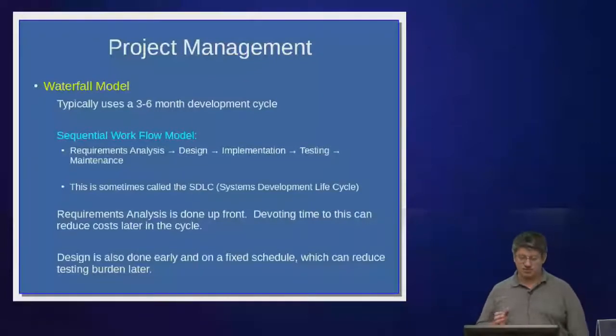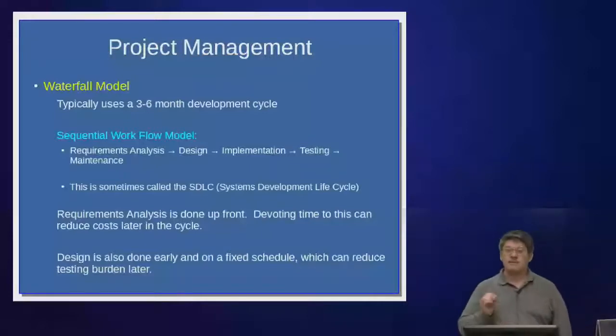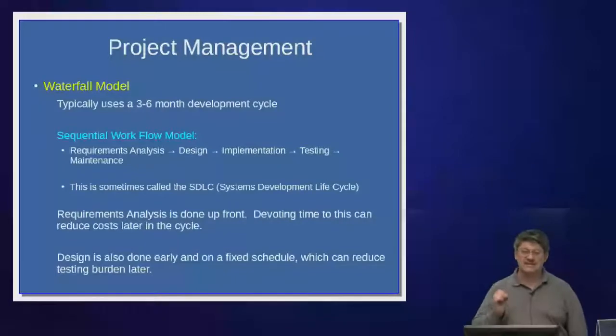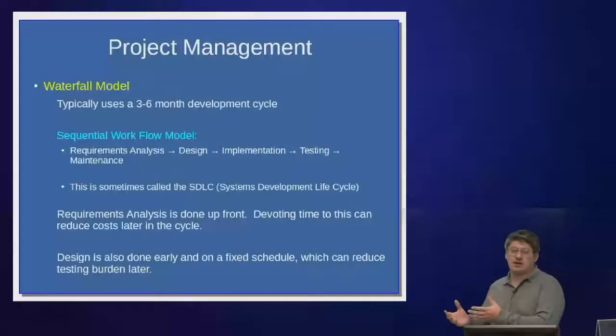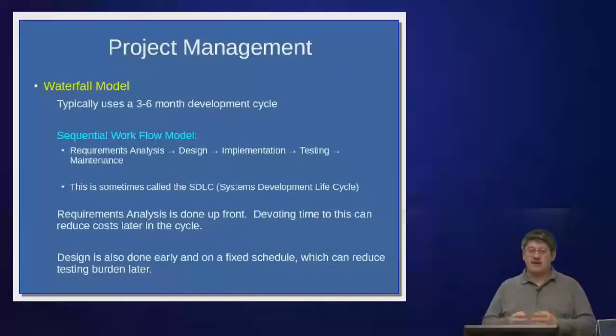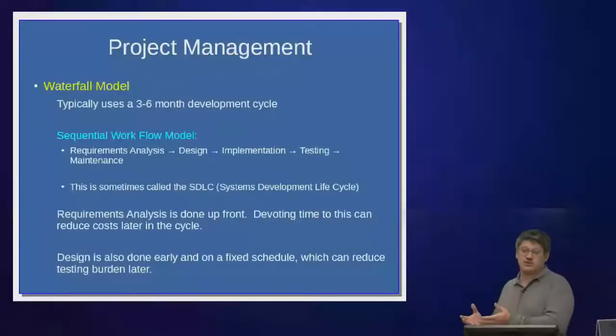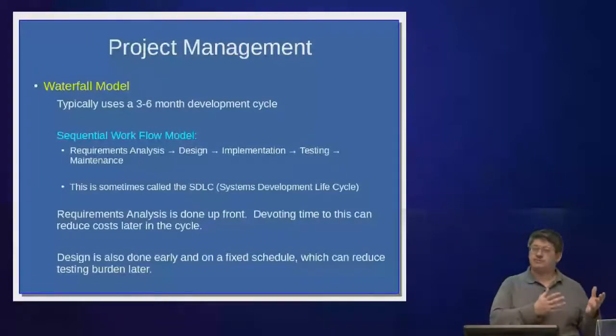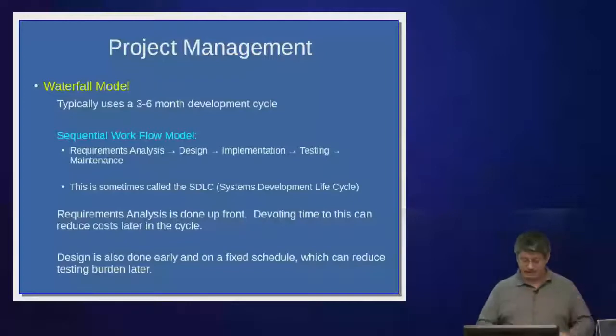So there's a lot of advantages to this approach. First of all, requirements analysis is really important. Before you sit down and create a website, you absolutely need to do a needs analysis to ask users what they want in your website. And so in the waterfall model, requirements analysis is done up front, and we dedicate a specific amount of time to it. And that can be a really good thing because it means we don't waste time later developing and implementing things that users don't actually even want. We also do design early in the waterfall model and on a fixed schedule, which again means that we're going to be more thoughtful in our design and we're more likely to have a good implementation. And so this can reduce the testing burden later on because we've taken our time to do a good design.